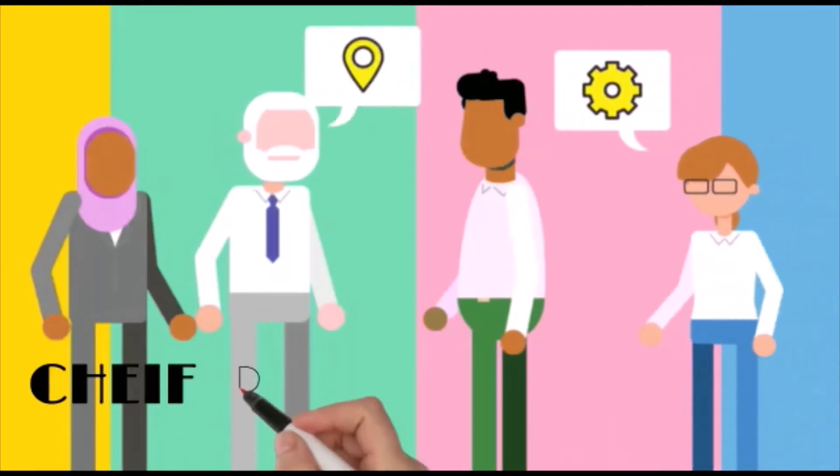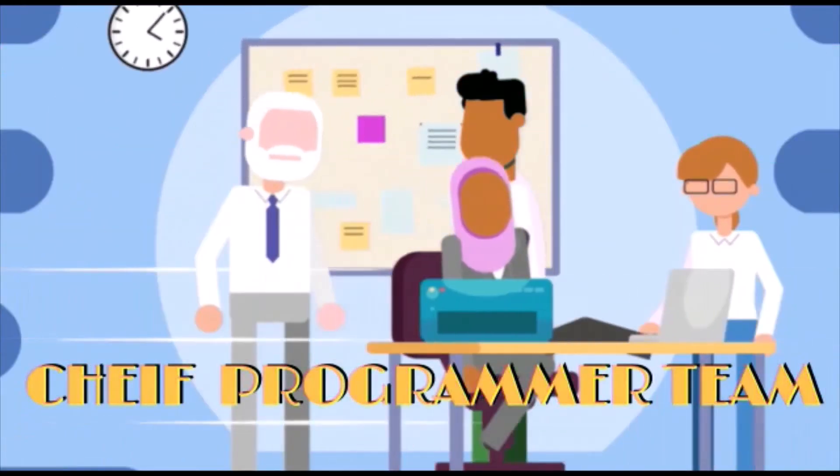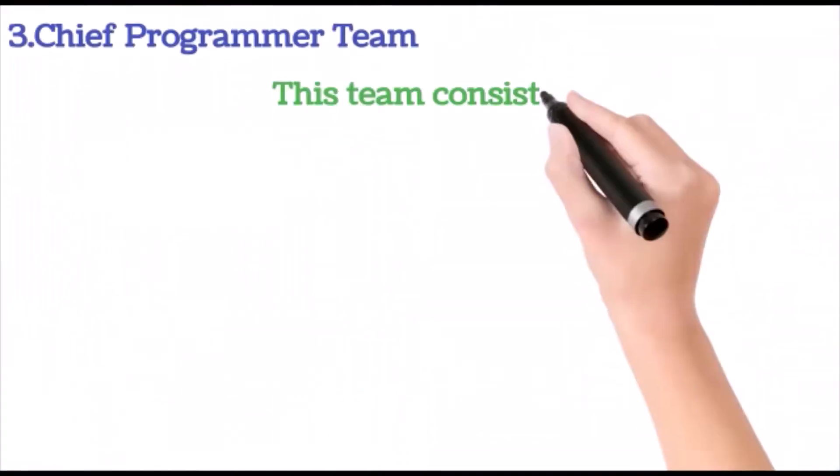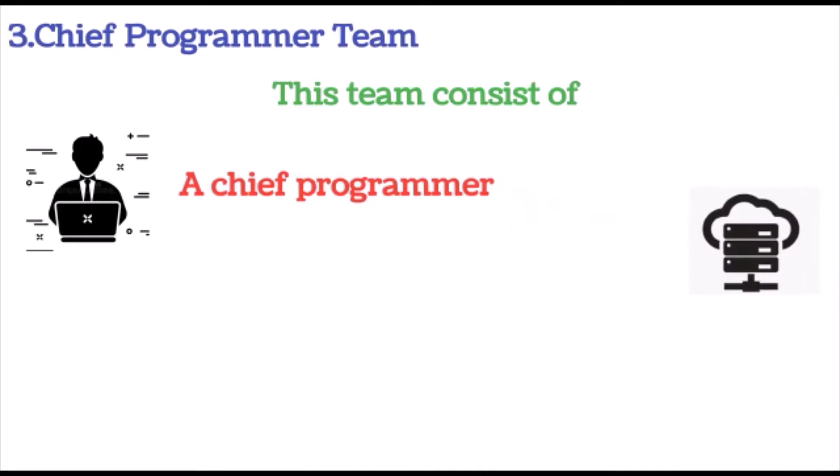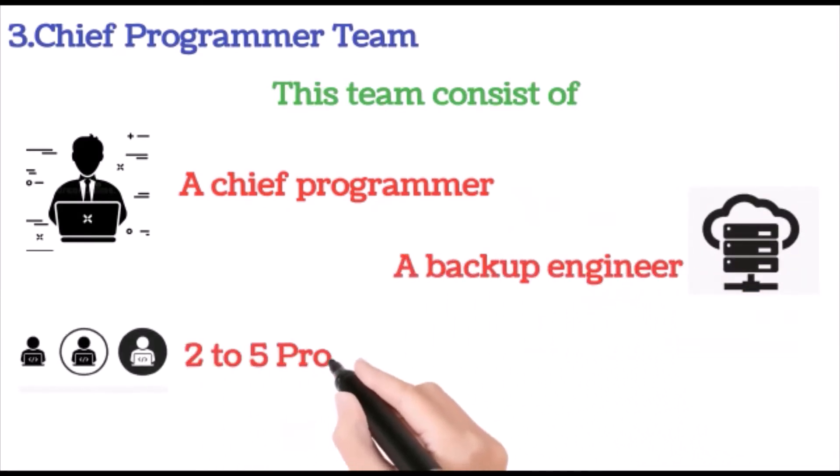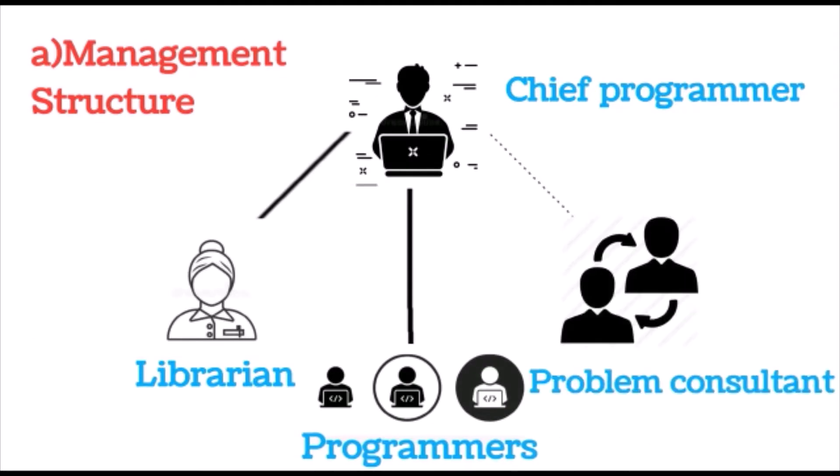Next is chief programmer team. This team consists of a chief programmer, a backup engineer, two to five programmers, and a librarian. Here everyone will be working under the chief programmer.